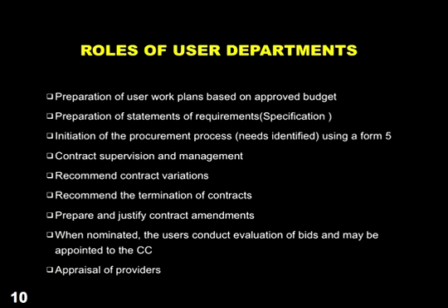It's at this evaluation process that we are able to determine if what we asked for has been provided, and also make recommendations to the contracts committee that among all the people who submitted their bids, it is supplier X that has done what? Fulfilled the requirements that we needed as what? User department. So that is a very critical area, and most of the things that are determined of any contract are done by the evaluation team.